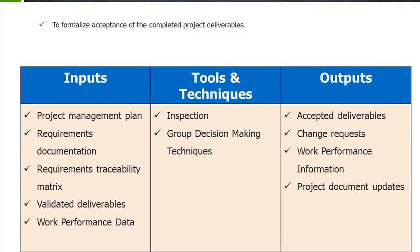The next process is verify scope — to formalize acceptance of the completed project deliverables. The customer does the verification. Inputs are the project management plan, requirements document, requirements traceability matrix, validated deliverables, and work performance data. Tools and techniques are inspection and group decision-making techniques. Outputs are accepted deliverables, change requests, work performance information, and project document updates.